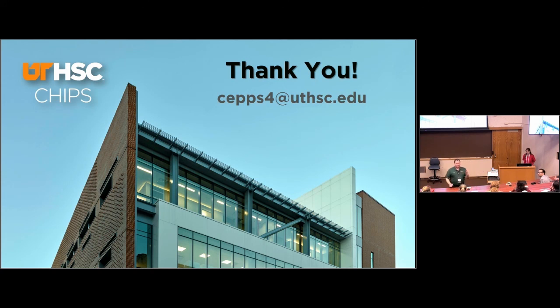Really what we've done in that commissioning over the past year is mostly AV. So anything that didn't require cameras or microphones, we slowly started to move into the space. Our nursing students have been doing skills in the skills lab for a full year. This fall will be their second fall in the skills lab. We've been slowly moving things over, and we're now at a point where everything is functioning. So beginning this fall, everything will be done here. We've had a soft opening, which is actually, I can complain about the long period of time to commission, but easing into full capacity has also had some benefits, recognizing things.